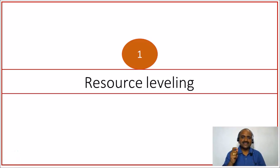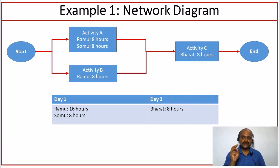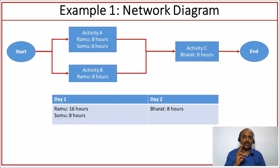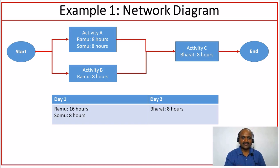Let us understand what resource leveling is using a simple example. Our example consists of three activities: Activity A, Activity B, and Activity C. Activity A is loaded with two resources, Ramu and Somu. Ramu is planned for eight hours and Somu is planned for eight hours on Activity A. The critical resource Ramu is also planned for eight hours on Activity B. On Activity C, Bharat is loaded for eight hours. This is the simple network diagram we have.